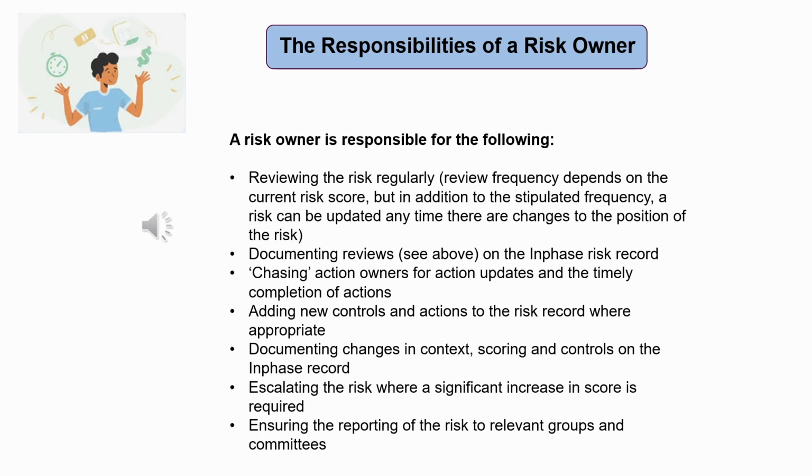On this slide is an overview of the responsibilities of a risk owner. A risk owner is responsible for the following: reviewing the risk regularly, documenting reviews, chasing action owners for action updates and the timely completion of actions, adding new controls and actions to the risk record where appropriate, documenting changes in context, scoring and controls on the InPhase record, escalating the risk where a significant increase in score is required, ensuring the reporting of the risk to relevant groups and committees.